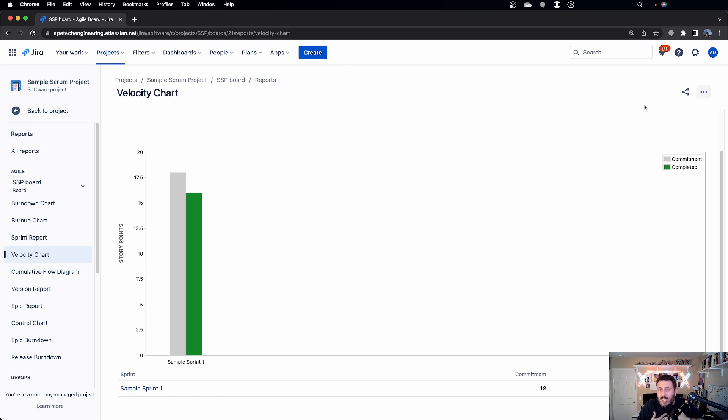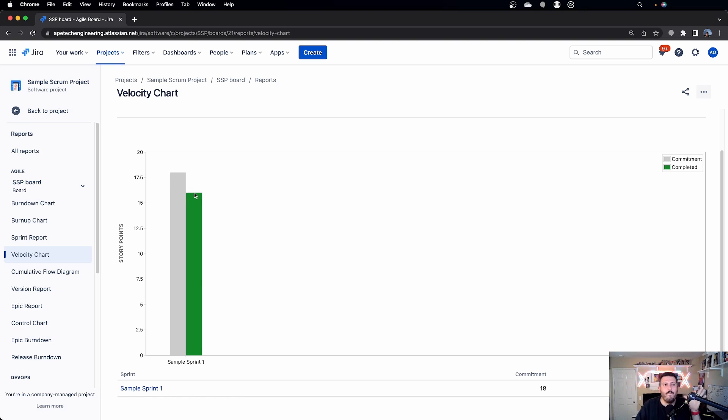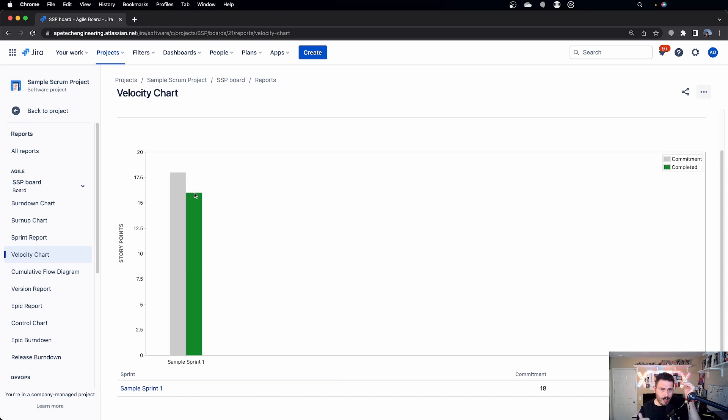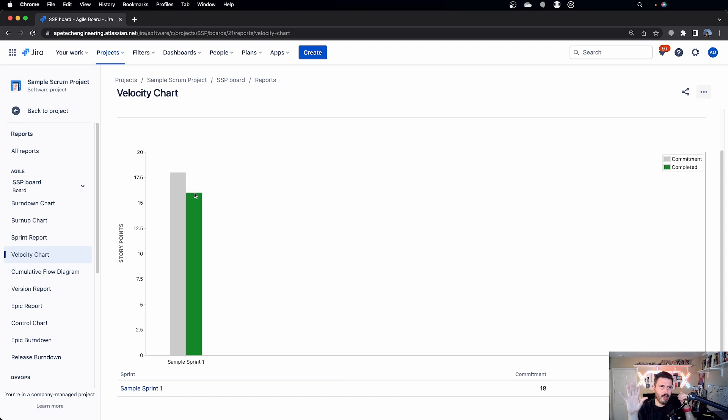Again, my rule is 80%, which basically means that this one should be 20% higher than this, and so the key things that you want to watch out for is these discrepancies. If you committed to 100 and your team finished 20, that's a problem. If you committed to 100 and your team finished 130, it's a problem, a better problem,